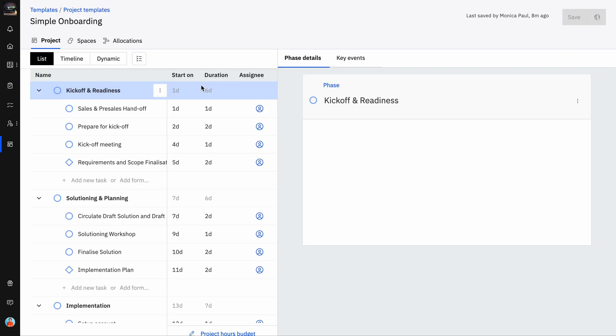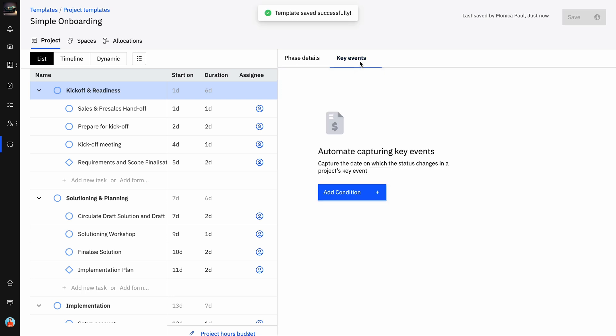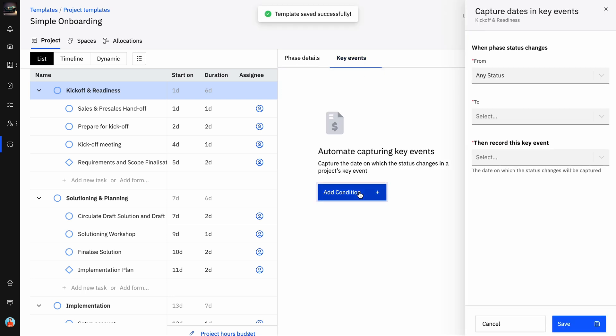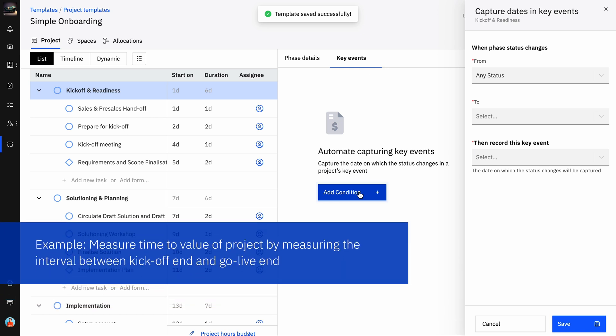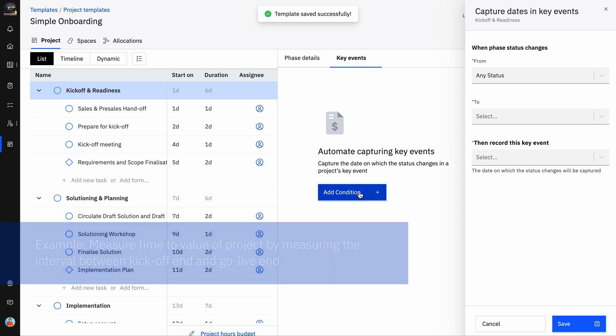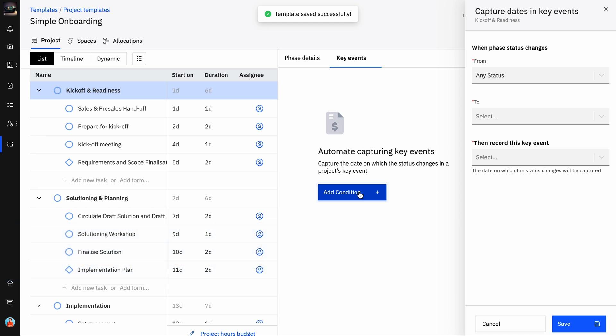Click on a phase or task that needs to be a key event. On the right-hand side, you will see a Key Events tab. Click the Add Condition button to open the Create Key Event slider. As per our sample condition, the kickoff and go live end are key events. Let's first create the condition to record the Kickoff End.